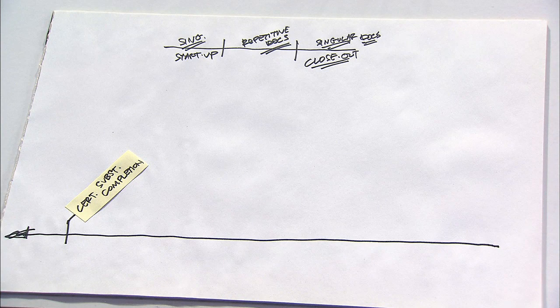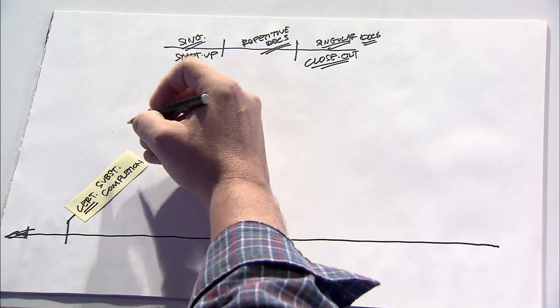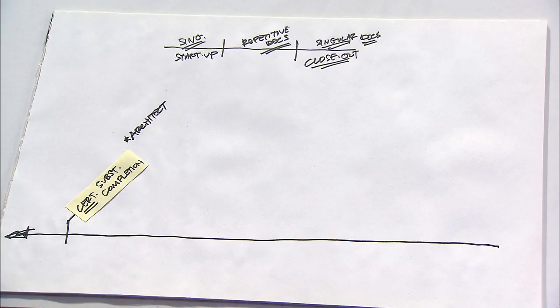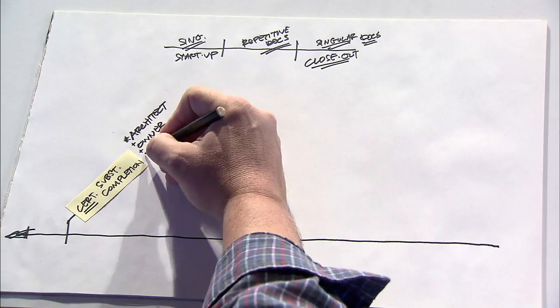Basically, none of the rest of the closeout components will occur until this certificate has been issued. And for vertical construction, this certificate is issued by the architect, although in most cases it also requires the owner to acknowledge that completion.